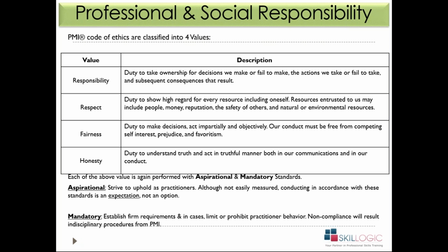Now, it's not necessary to communicate the same information to your team members, because once you communicate, the team is going to utilize that time period. What you want to communicate to the team is without the buffers, so that they try to finish the work earlier than the commitment given to the sponsor. So you might have communicated 10 months instead of 1 year to your team members. So that's aspirational.